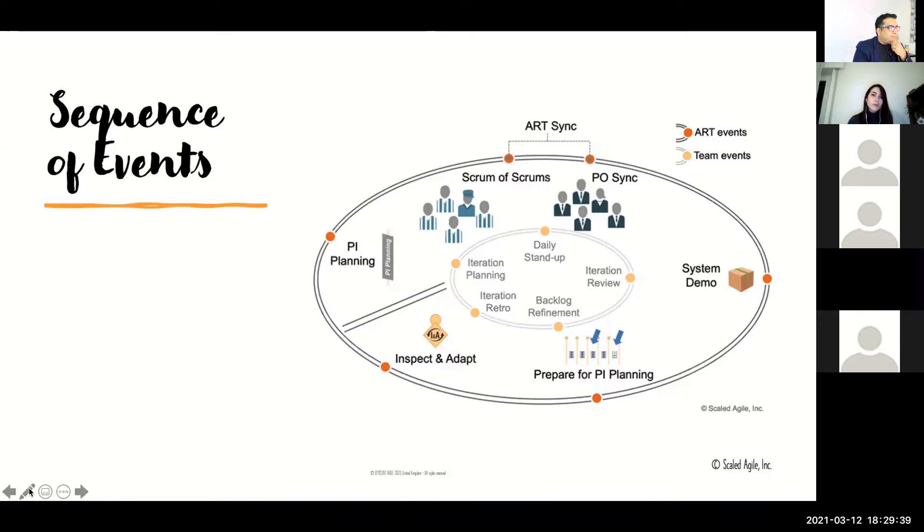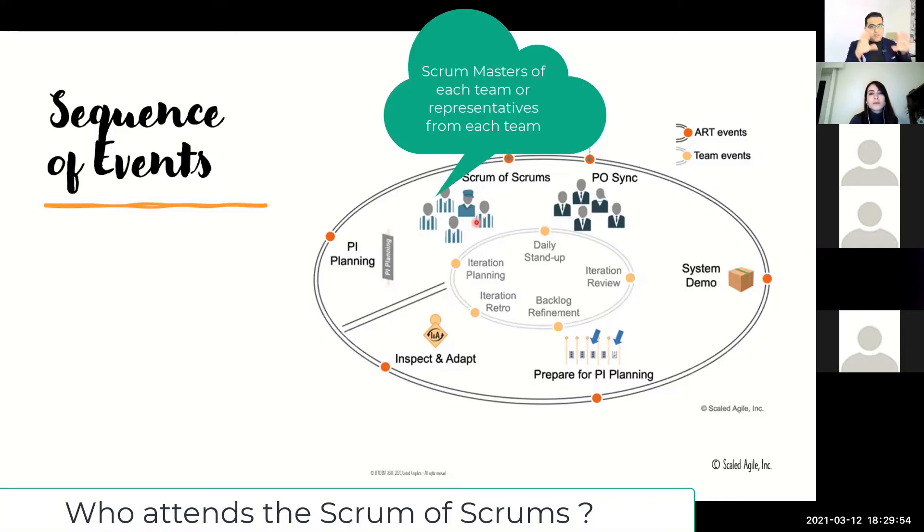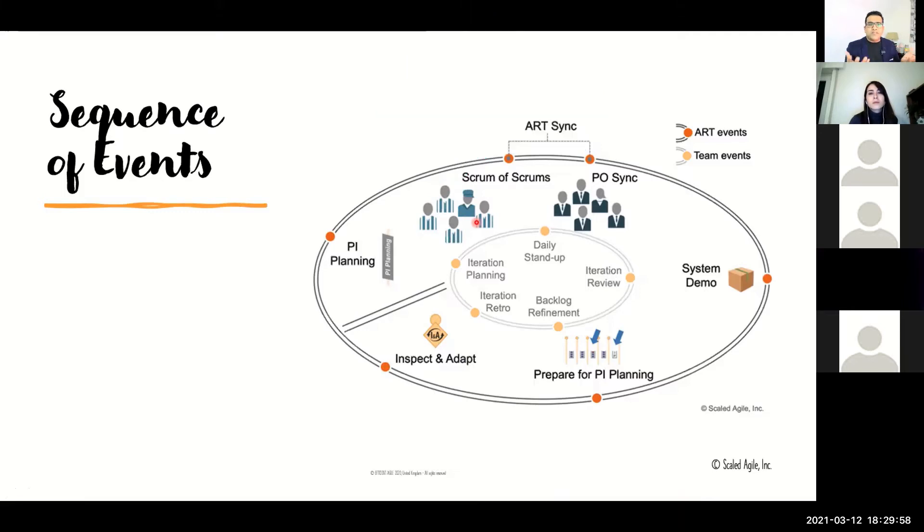This is the RTE, the one with the hat. You've got all the team members around here and these are the scrum masters. Who comes to the scrum of scrums? The scrum masters. If your scrum master is not available, you could also get a representative from each of the teams who has enough knowledge to address the dependencies or impediments.